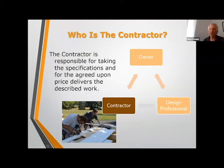We're actually in the process right now of giving a proposal to a community that is replacing all the roofs, replacing all the trim on their buildings, and doing some siding work. They've got wood siding, and they're very interested in doing the entire job on a percentage basis, where in this case, depending on how long the job is done over, it's going to be in the range of 6 to 8% of the construction cost, where we will do everything. We'll do the spec, we do the bidding, we oversee the job on a very regular basis. And it's essentially a lump sum, but it's based on a percentage.